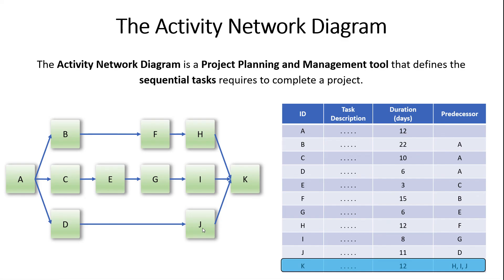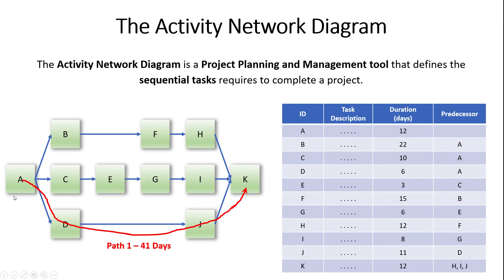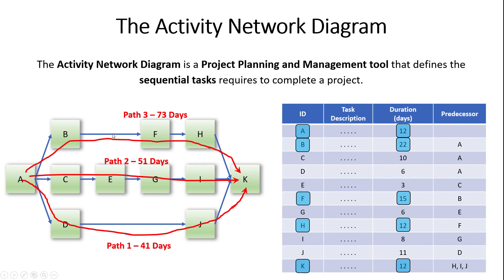Once we've laid this all out, we can start talking about the critical path — which activities are most critical to completing the project on time. This diagram has three different paths. Path one covers tasks A, D, J, and K and takes 41 days. Path two takes 51 days. The third and final path — which is the critical path — is tasks A, B, F, H, and K, taking 73 days. So if your boss asks how long the project will take and what the most important tasks are, the answer is tasks A, B, F, H, and K. Those are the ones that cannot slip and that define the completion date: 73 days.